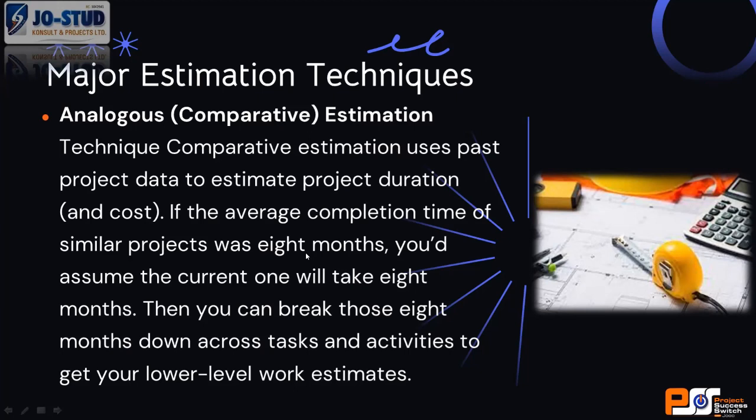It's embarrassing to walk to your client and say the QS misled me when you were the project manager. No. Don't say that the figure in the BOQ was what I followed and see where it has landed us now. If you say that, it's inexperience. So what you will do is analogously say that, okay, because I have done something similar, it should be around this range. You can keep it in your belly. But when your QS brings his bill of quantity, you can only note to say that, okay, that's true. It should be somewhere around there, slightly higher, slightly lower, somewhere around there. So that's why analogous estimate is very, very important for every project manager to have an idea of.